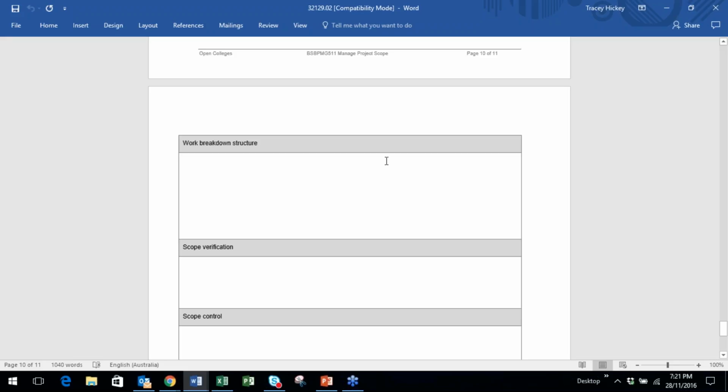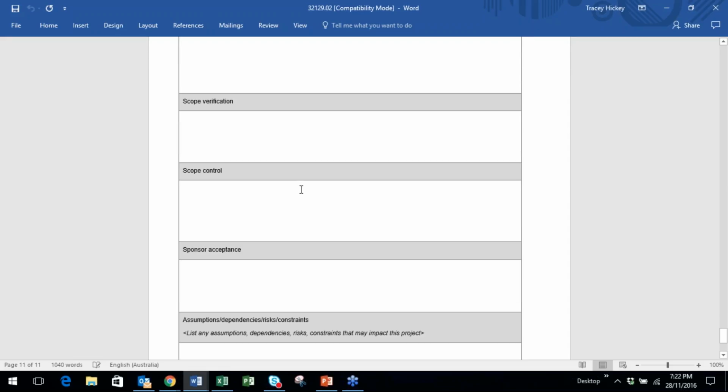So you should be able to break it down at least 3 levels in your work breakdown structure. If you're using your work-based project, that could be quite diverse as to how big this is. Once again, it will depend on your project, but make sure you always have a planning stage and a closing phase, and then all the other parts of the project in between.